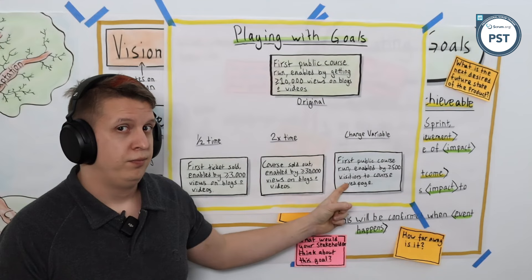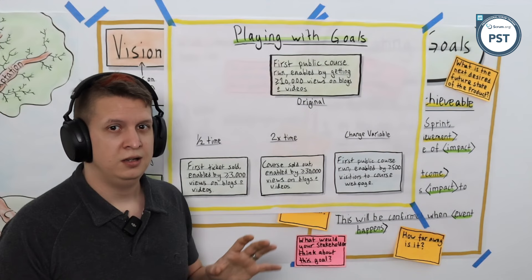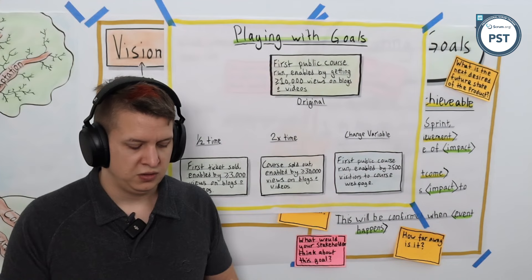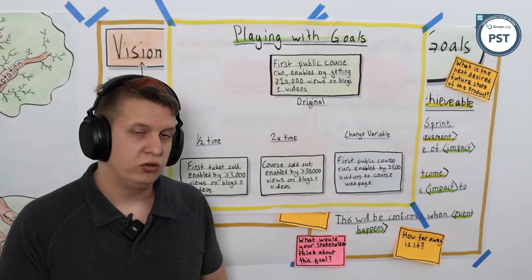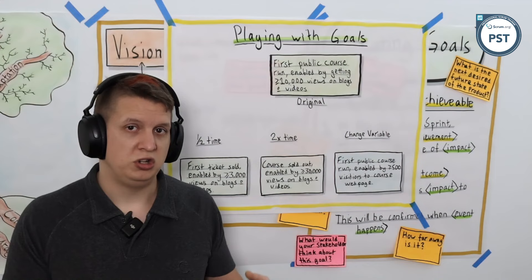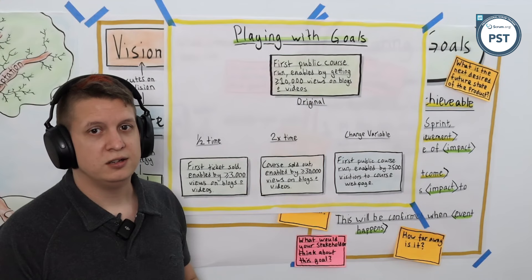And all we did was tweak a single variable, and by doing so we could have changed the entire product backlog. So how you construct your goals, be it the sprint goal or the product goal, will drastically influence the product or sprint backlogs, and it will also influence heavily the kinds of experiments, the kinds of work you're doing to achieve those goals. These goals necessitate blogs and videos being made.